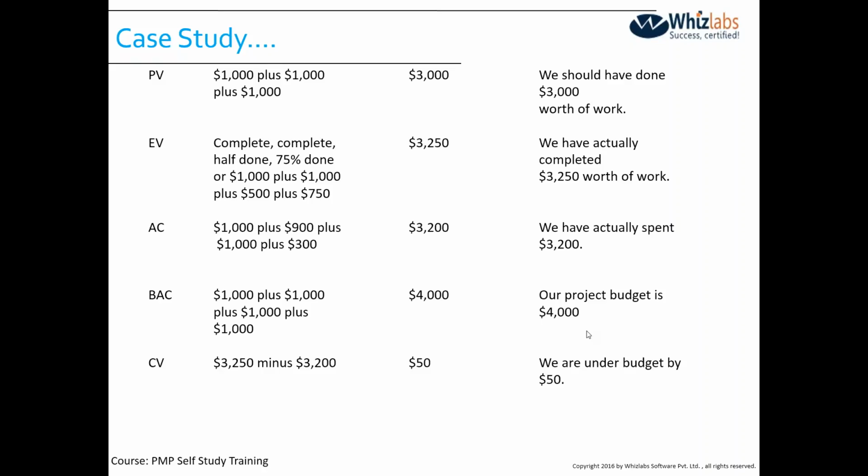Yes, Adam, you are right, in a lump sum contract. Now, when you say lump sum contract, I'm assuming that you are talking about a fixed budget project wherein the client has agreed to pay X amount of money, irrespective of whether you spend X plus 10 or X minus 10. They have agreed to pay a certain amount of money, which is also called lump sum, and it is also called fixed price.